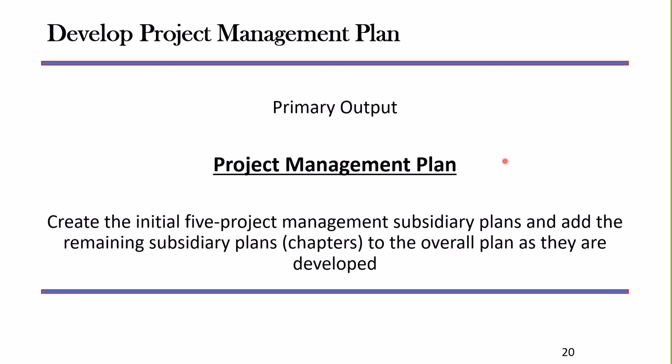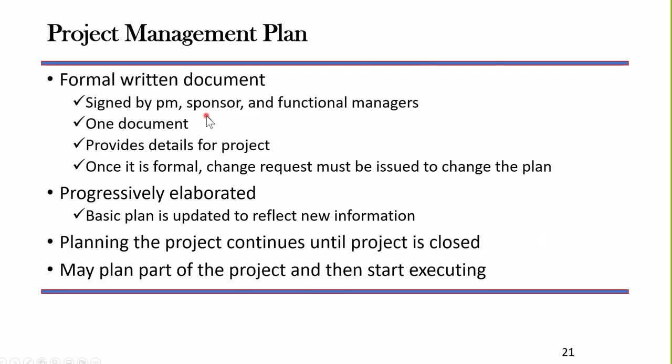We have our stakeholders' requirements. Next, we need to have a project management plan. When we talk about a project management plan, in traditional project management, we're talking about up to 19 subsidiary components to that plan. We have one project management plan, but that one plan is going to be made up of perhaps 18, 19 different subsidiary components. We look at that in a little bit deeper depth.